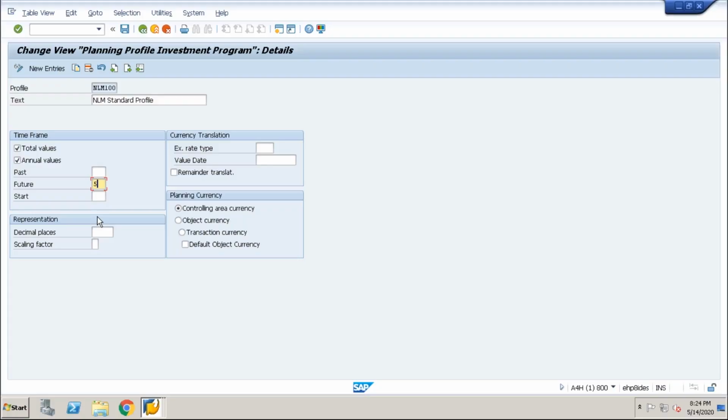Okay, maybe the past option is used if you have just installed investment management and you already have some projects on the way. So you need to inform that you have a past year done, and then you're going to start controlling the project with investment management from now on. Okay, that's the idea. Exactly, you're correct. When we upload the values, let's say any migration data is also there and you want to keep it year-wise, that time also it may be required.